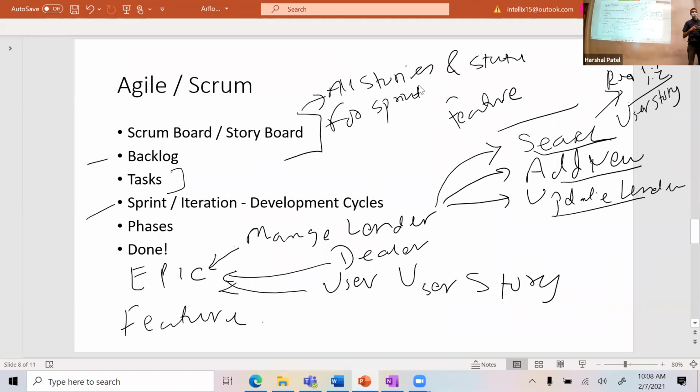So when you pull in the stories, they are new stories. But if somebody starts working on the story, like implementing the development task and so forth, they can move it to active. Finally, if they are done, they will move it to resolved. Okay, so that's the storyboard. It talks about the progress of the sprint visually. Okay, and I'll show you what the storyboard looks like in the tool. But conceptually, I think Jira, ALM all have some type of storyboard. It just looks a little bit different. And so that's the storyboard.